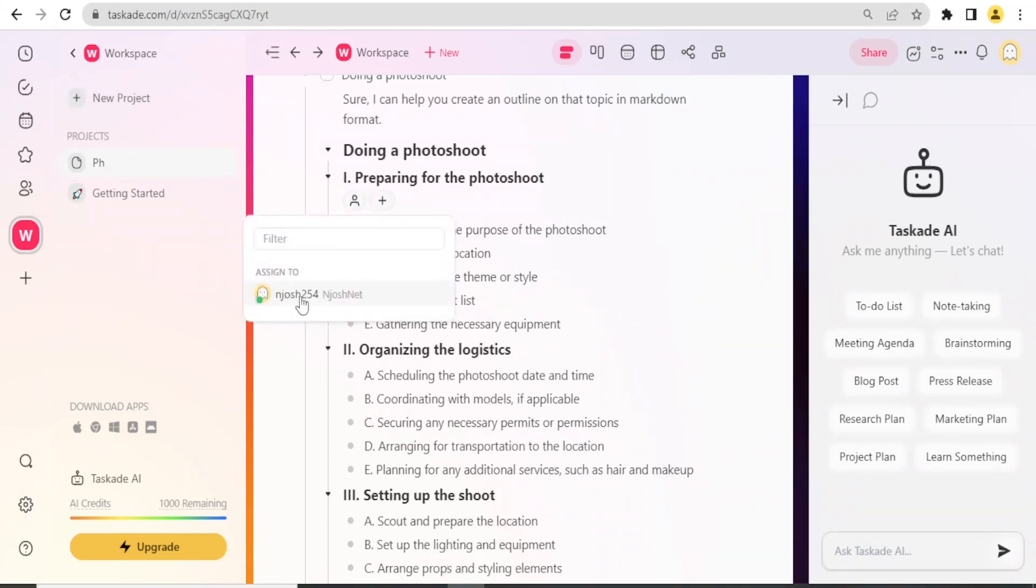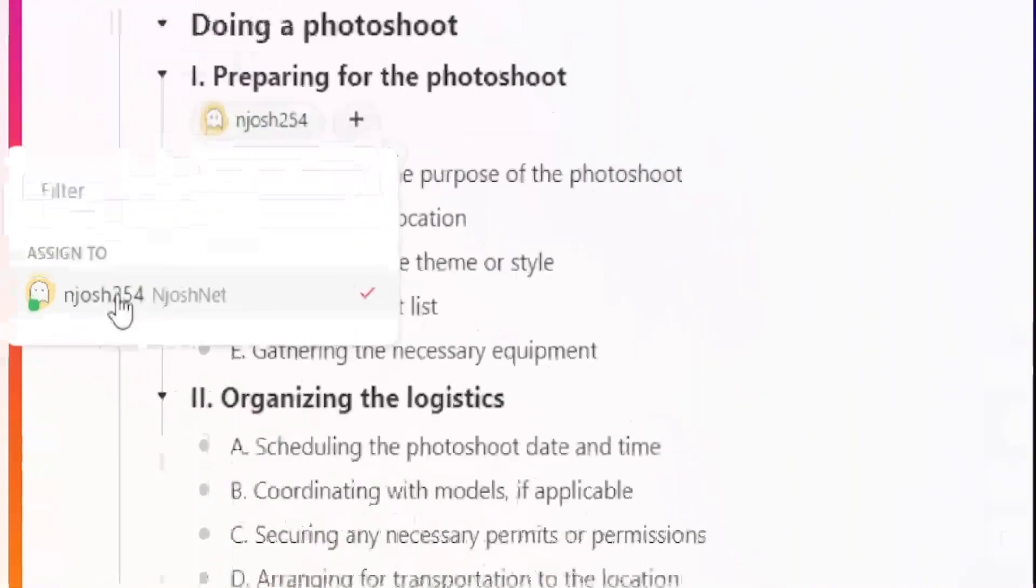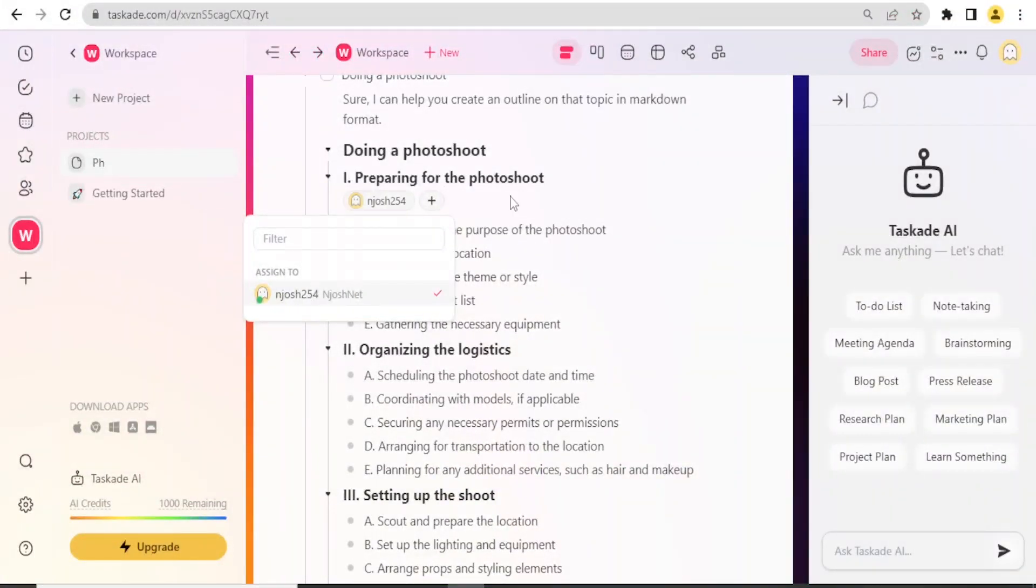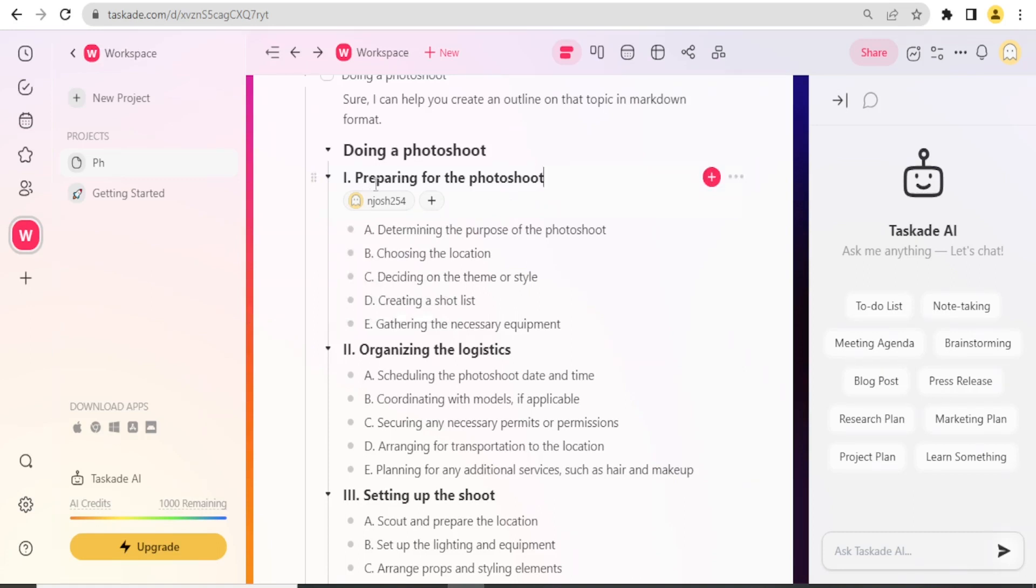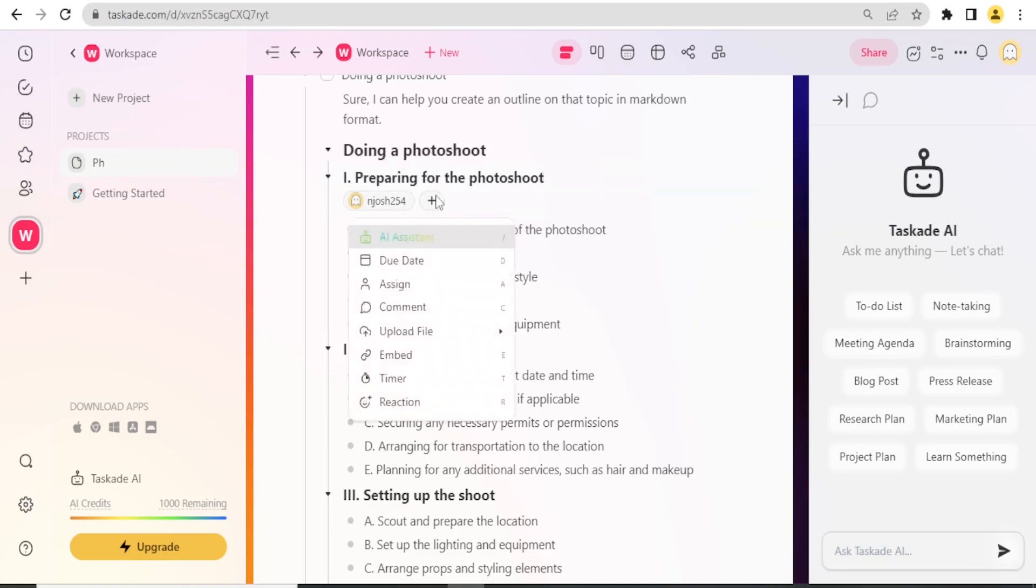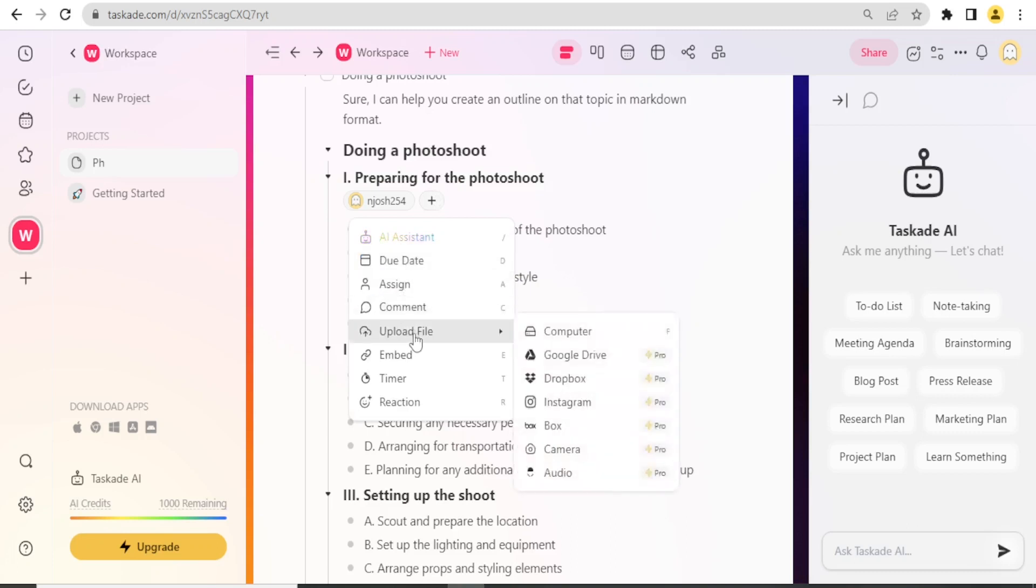Let me say I want to assign someone in terms of preparing the photoshoot. I click on Assign. I'm the only one currently on this workspace, so I'll assign that to myself. Notice here, Preparing for the Photoshoot, we have assigned to Josh254.